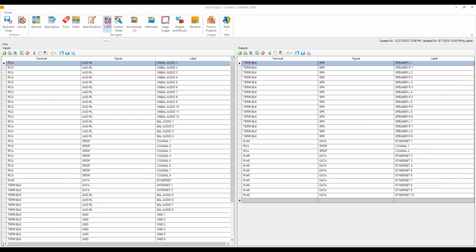Now, the IOs, we track this if you want to get down to the wiring diagram detail. It's a very good idea to have all of your systems documented from an IO level so we know how everything's connected up. This makes that process much, much faster. It could easily save you 70 or 80% of your time since we have that data there. And what's nice is it also builds cable checklists. So if we're doing an install in a new project or upgrading a system, it'll break down all of our wire connections and what they're going from and to.